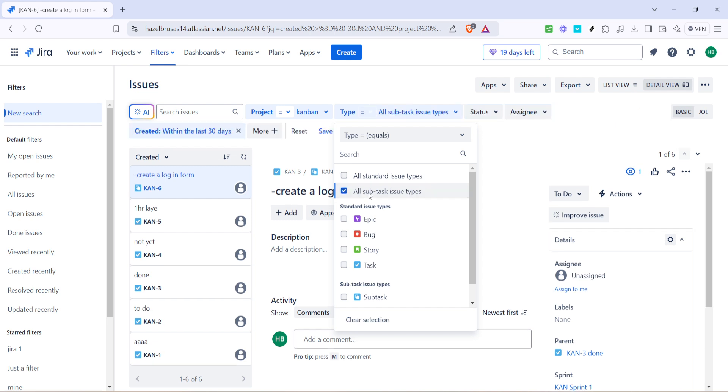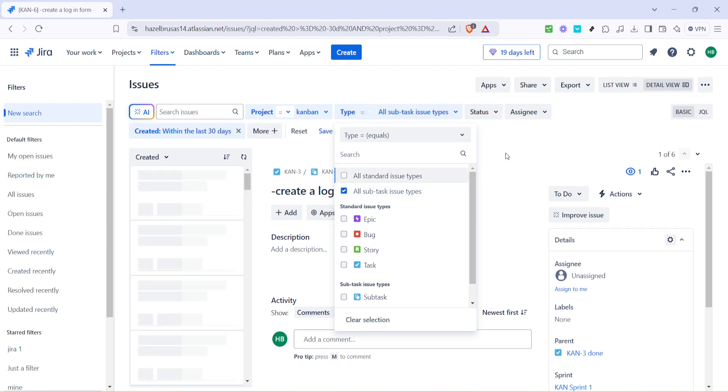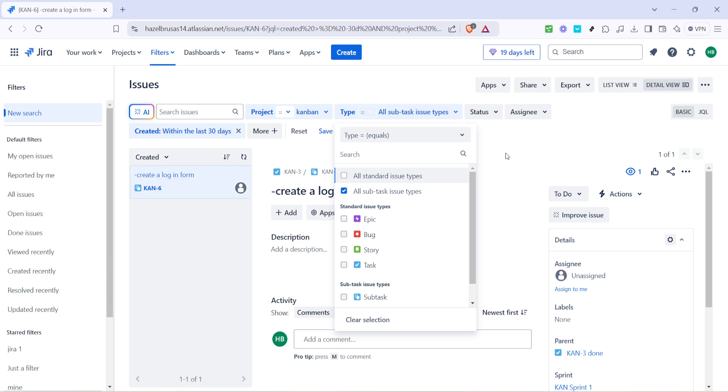The final step is to click on all subtask issue types. By selecting this, you grant visibility to all types of subtasks associated with the project.